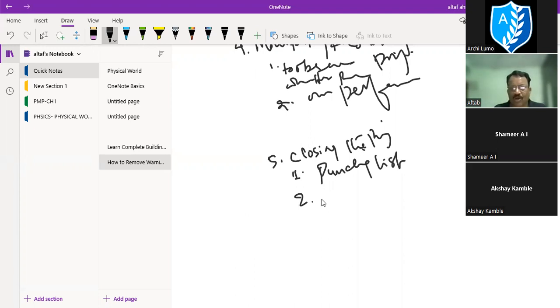Then the next one is ITP and OM, the inspection and testing plan and operation manual, which you have to prepare. How? If a substation is there in the campus of that facility, the complete electrical items, IT items, MEP items, everything has to be inspected and tested either by the client or consultants, whatever is the provision in the contract.